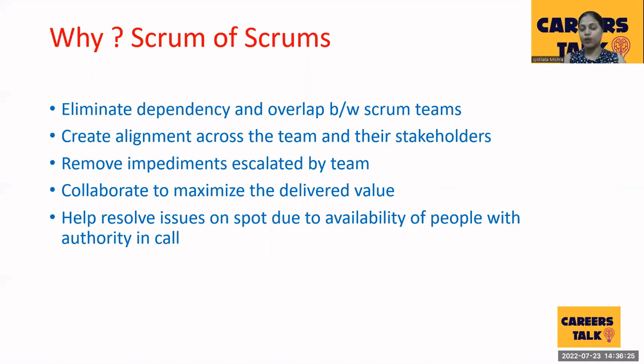Say you have done the upgrade on Friday. What we'll do is schedule a regression run on Saturday and Sunday, and then on Monday, as a whole group, the whole 3-5 teams, we can divide the analysis. So this meeting gives you that chance to collaborate, see how you can all work towards a common goal, and help each other out.